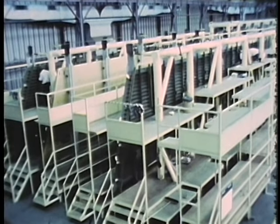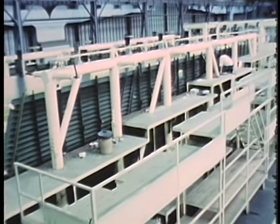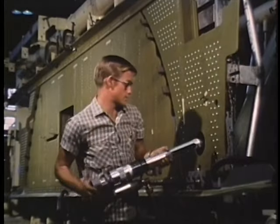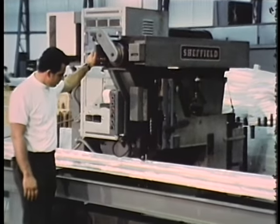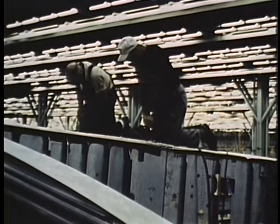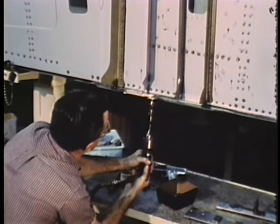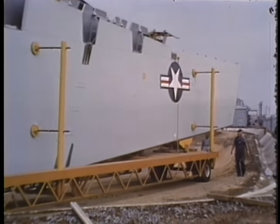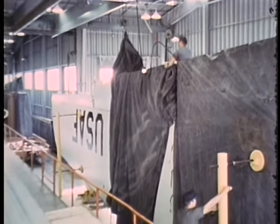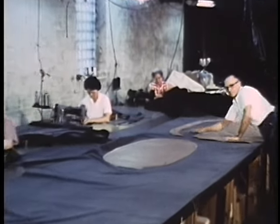Precision assembly is crucial because many other subcontractors are making components which must fit to it, on it, and into it. If each workman and each contractor worked to the outside limit of the dimensional tolerance, the tolerance buildup at Marietta would, well, be too snug. Therefore, everyone is reaching for the center of the tolerance. And finally, the wing is on its way to completion. It will be protected in transit by a slipcover made by the Nashville Tent and Awning Company in Nashville, Tennessee, one of the many small suppliers who are surprised and pleased to find themselves in the aircraft business.